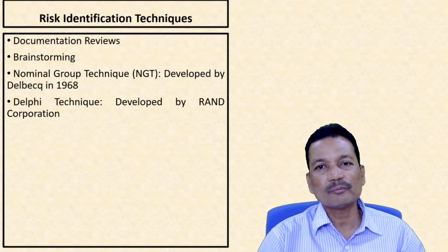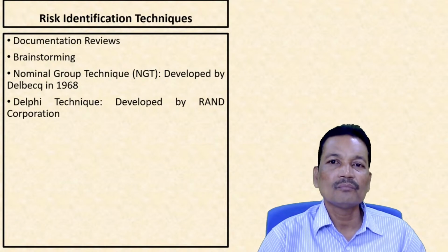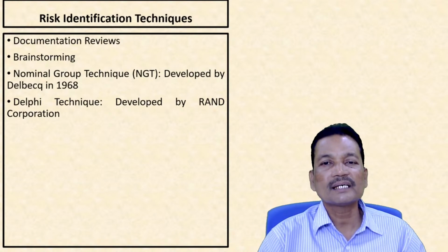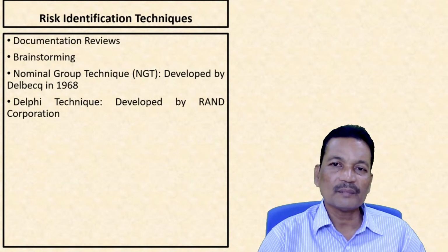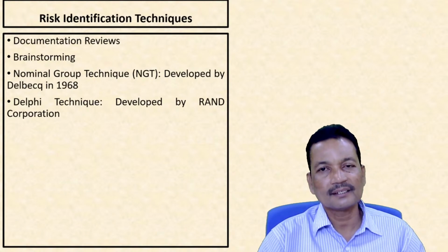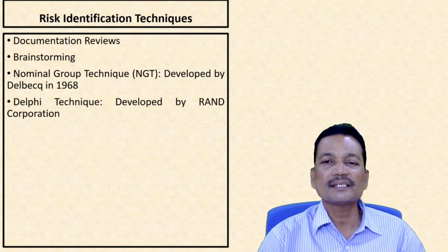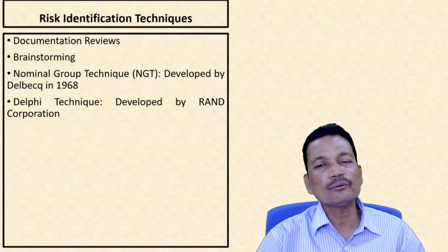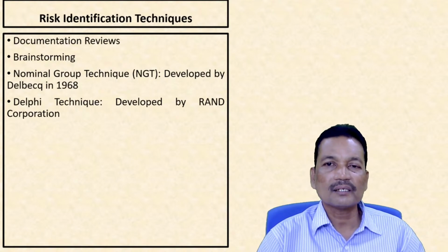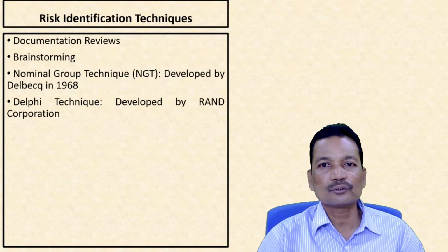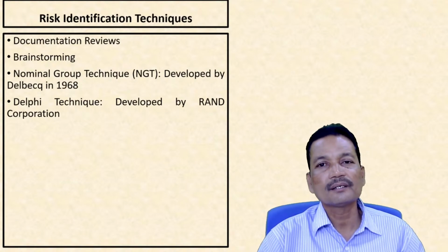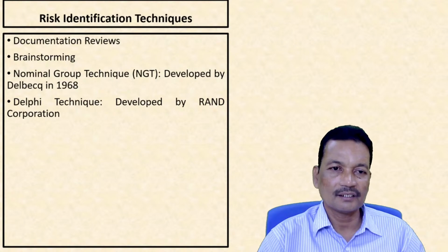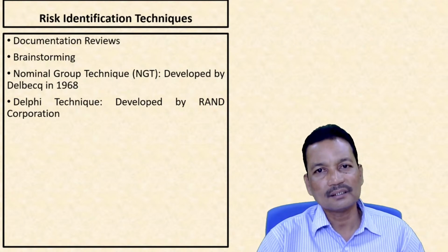The scale will have numbers varying from 0 to 5. 0 will be, we can say, no risk. 5 will be very high risk. And 3 is risk neutral. So according to the scale, they will try to judge the various risk factor scores. And this will be taken by the project manager and he will compile it and find out what the risk is.